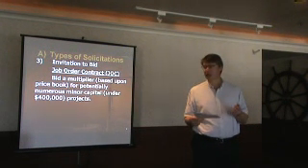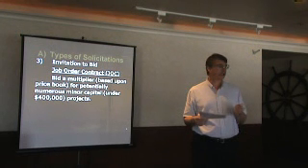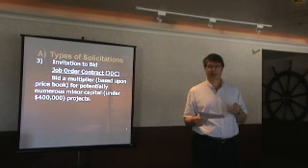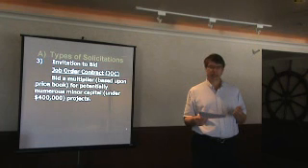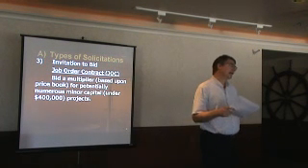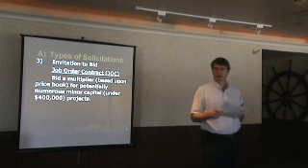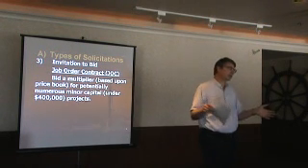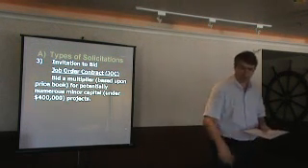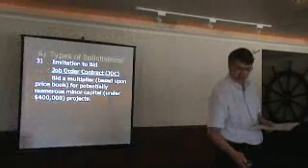You're awarded the JOC contract. The only thing that we currently guarantee you on our JOC contract is $50,000 worth of work over the 1-year term. Maximum value on most of our JOCs is $3 million, so it could be as much as $3 million. The term is limited to 1 year from the notice to proceed.